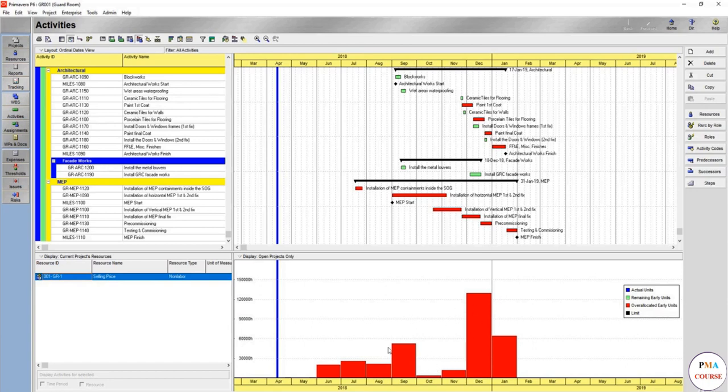Or if the resources are allocated to different projects in these two months and then come again, this would be reasonable. But if you're going to use the labor only for this project, it's optimum to be bell shaped. Even for the selling price, it's optimum that you go gradually and come back again.